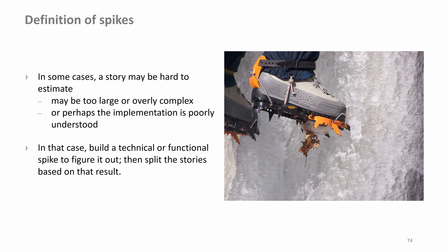Collective accountability is established for the key decisions made. Acceptable. Like any other user story, spikes are accepted by the product owner if the acceptance criteria for the spike are met.